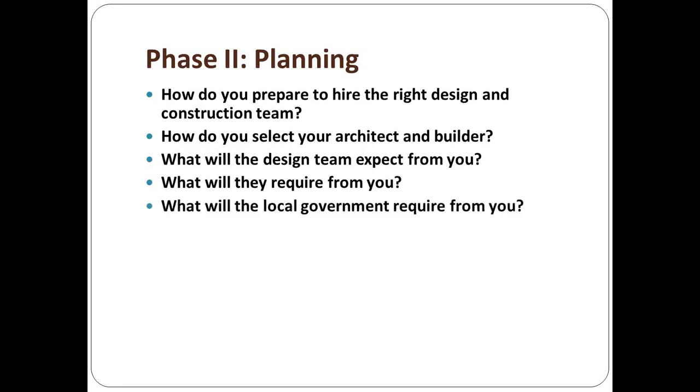What will the local government require from you? Well, you've got to get your plans permitted and permission. Here in South Carolina, I had to go each time I built on the property and go before the Board of Zoning Appeals to get permission to build, because church doesn't fall within residential, commercial, or industrial. And we had to get permission here. So you need to go find out what they require.